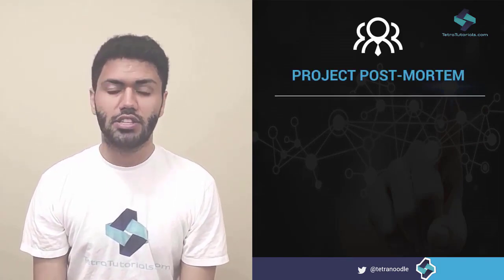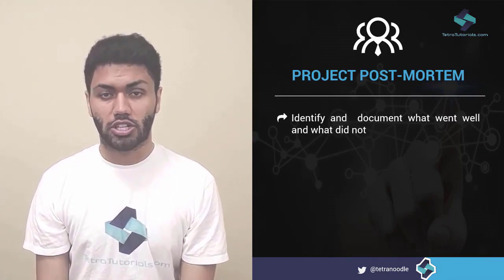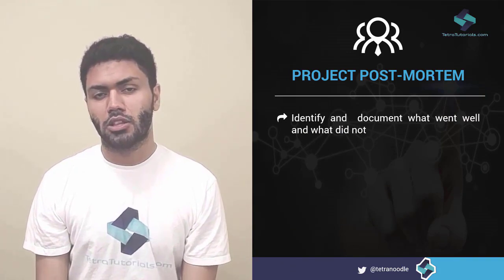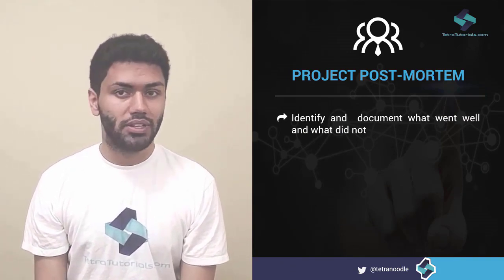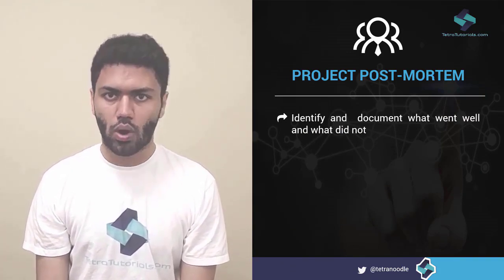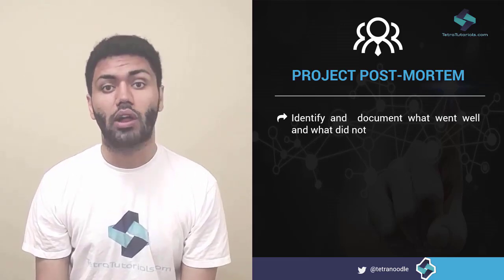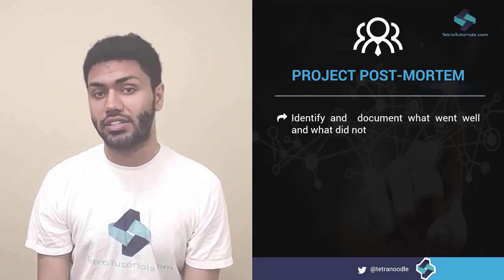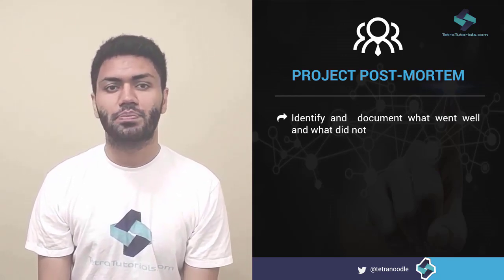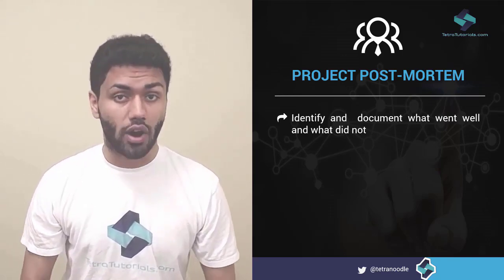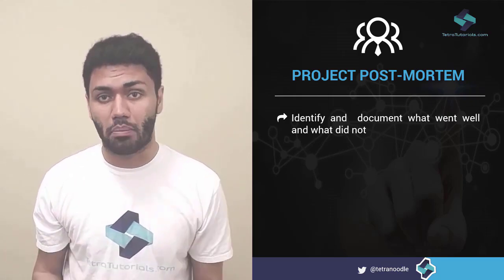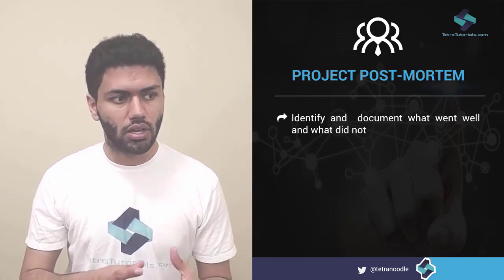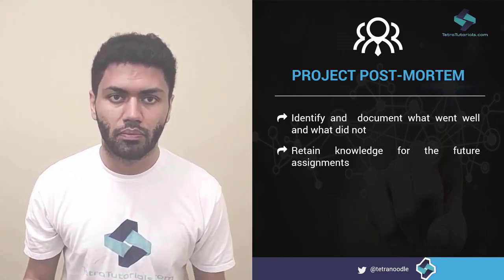Project postmortem is the final activity in the project closure. The project manager has to sit with the entire team to identify what went well and what didn't go so well. These discussions and findings must be documented and distributed among the team members. This gives an opportunity for every member of the project to speak up about the project in an open forum.